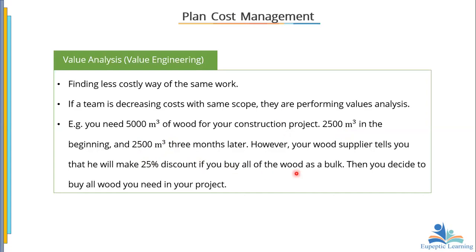But note that you don't just do this by looking at the discount. You're also going to look at the item that you're going to purchase. Is it one that perishes? If it perishes over time and you buy it in bulk, then you are going to lose if you don't have proper storage. You get the point here? Good. So you are going to look at all these scenarios before you come out to say that, okay, if that is the case, I am going to buy this. So that is value engineering, value analysis. Finding less costly ways of doing the same work.